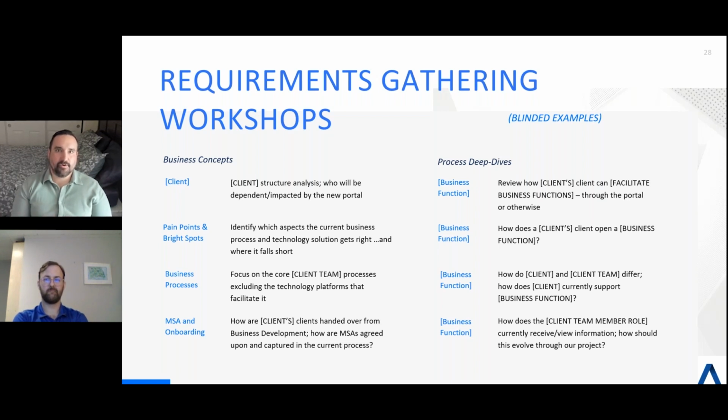So their hierarchy, who works for whom, how information flows throughout the company, how approval for changes to marketing strategies is undergone. Okay, let's have a workshop with the approver, what we call a stakeholder interview, where it's, hey, approver, what are you looking at? What is your decision process on whether or not to approve it? How can we make sure that when you're prompted to approve or disapprove, you have all the information you need, provided in one step, so you can more efficiently approve this and we can take you out as a blocker without giving up your level of control over the project?